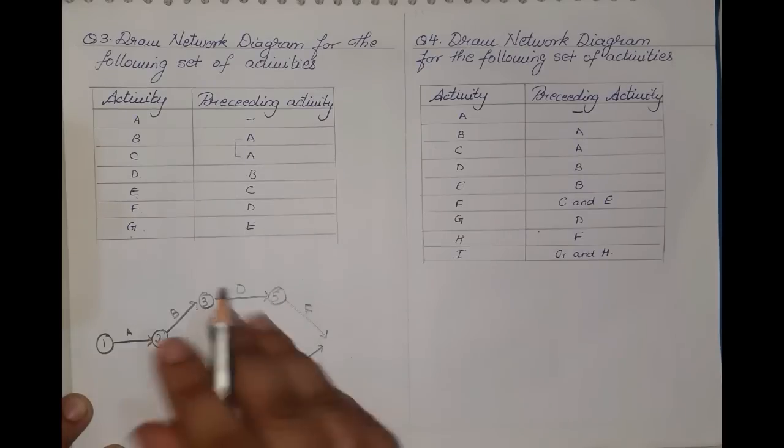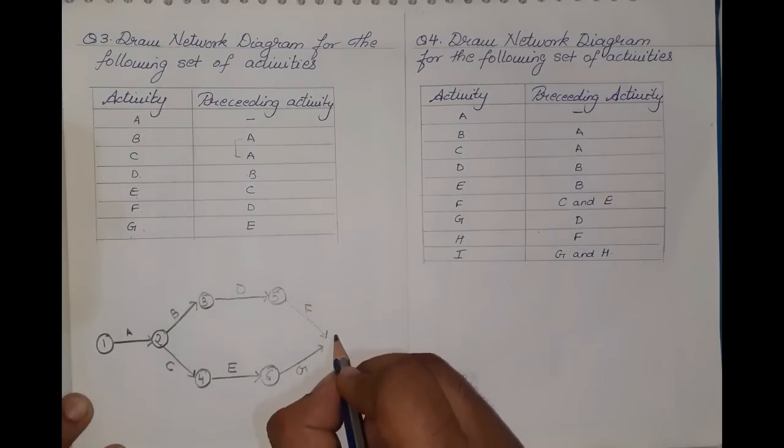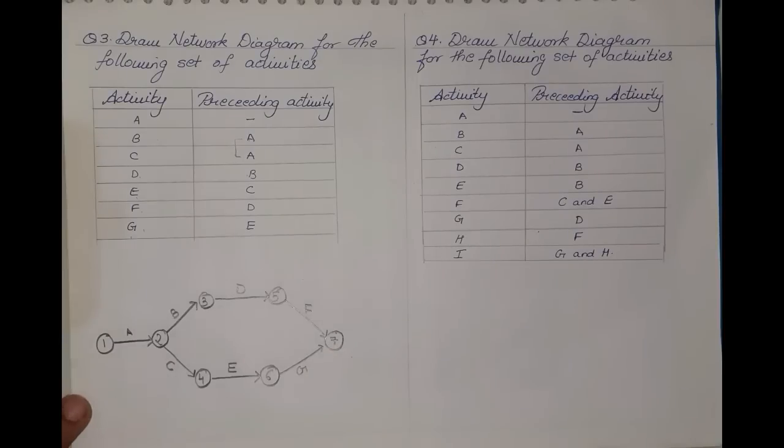Okay, after that it's not showing anything else, no other activities are there, so we merge them to the last activity. So this event gets closed at event number 7. So always remember in a network diagram where the diagram is not closing down, in the previous 2 sums that we had done, it used to always close down to one single activity.